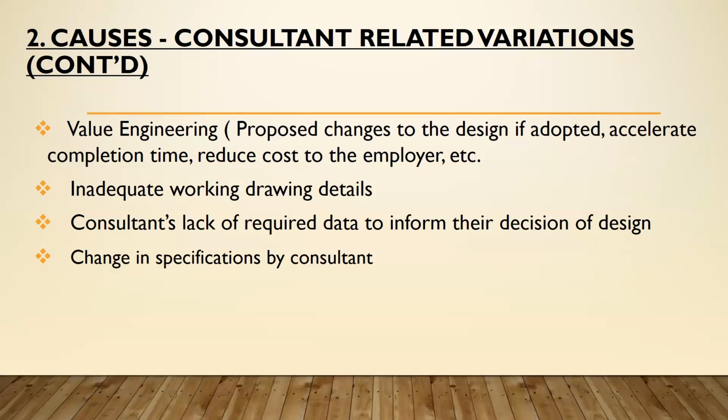And where we have inadequate working drawing details, and where the consultant also lacks the required data to inform his decision to design during the design stage, during the implementation stage, when the designs are finalized, there will be the need for a variation order to be prepared. And the consultant may also effect change in specifications.